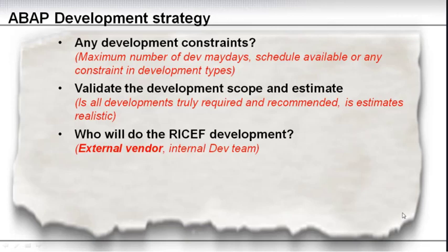I've seen projects get in a lot of trouble, which they will never recover from, if they cut this very close. Meaning we get the design signed off, and when the functional team starts on the specs, the development specification and the configuration, you start the external development vendor selection process, and you don't get that finalized, so you don't have a competent development team established that can be part of the specification documentation process and understand what they're going to build.